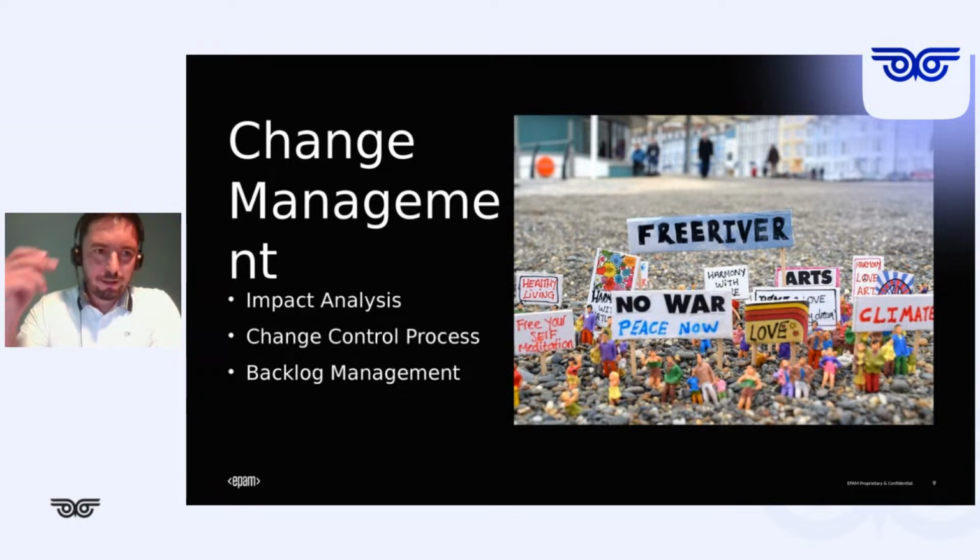So it can be considered from different perspectives. And yeah, as a final result, backlog management is one of the tools which is used for change management. So you have to clearly understand which part of your backlog is baselined, which part is dedicated to the change request and requires different processing.